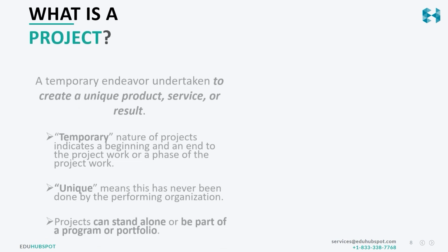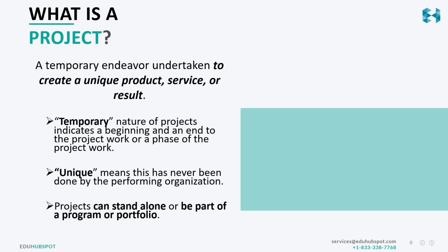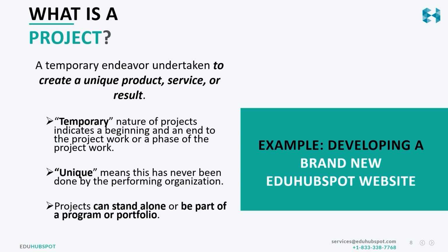We are talking about project management, right? What do I mean by project? Remember, there are three important keywords in project. First, a project is always temporary. Now, what do I mean by a project is temporary? It will always have a specific end date associated with it. It's not an ongoing thing, because if it's an ongoing thing, it is known as an operation.